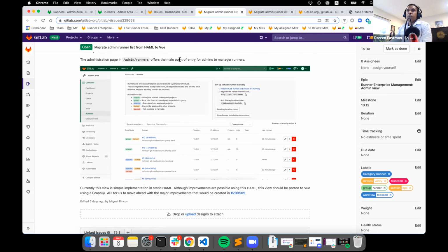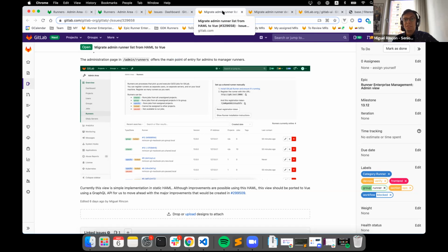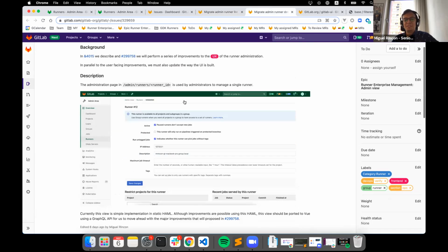That makes sense. So basically, all we're doing for our initial iteration is changing the underlying front-end architecture to use GraphQL and the new components, making minor visual tweaks to the existing construct, and then in parallel, we'll be looking at onboarding our designer, maybe even getting some of our current ideas that haven't been vetted by design in front of customers, and then from there, we'll come back and see what the design changes are. And I will make some assumptions based on what we have already. I assume that we will always have a list, and we will always have the runner details. And if that changes, then maybe we'll have to rework more things. But if not, then I think we'll be fine. We will not have to rework much once the UX comes.